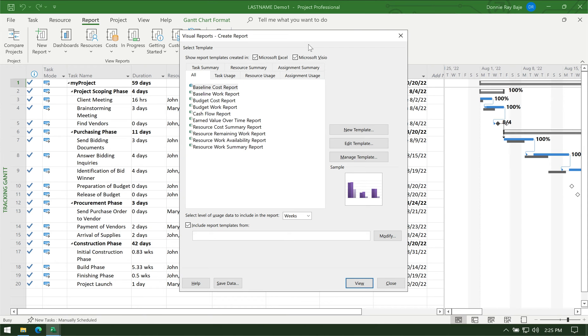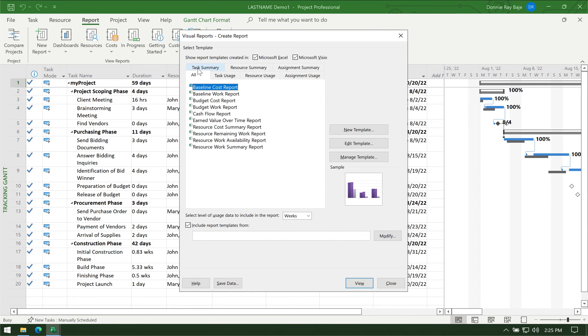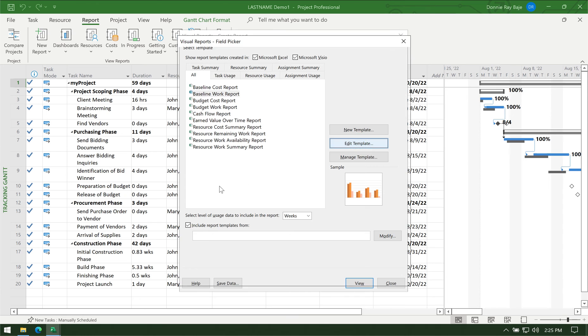In the Visual Reports popup you will be seeing several tabs. Let's go to the All tab. What we need is the Baseline Work Report, so under the Baseline Work Report, once you've selected that, click Edit Template.